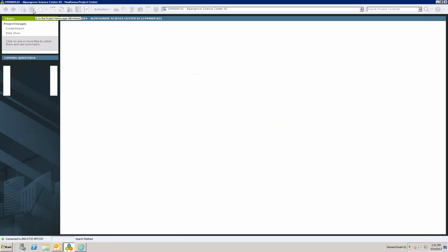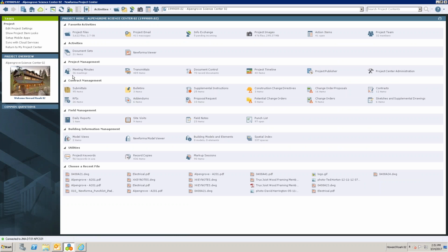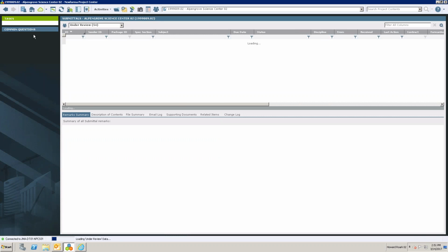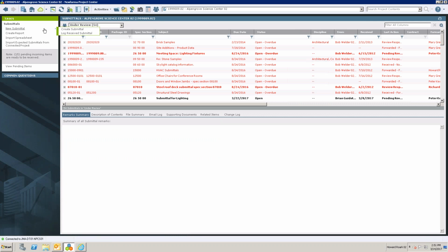Well, submittals are associated with the database. Because you have a folder called submittals doesn't mean it's going to create submittals and RFIs in the contract management portion. So these would both be blank. You would have to manually come in here and add a submittal and log that, each one individually. Correct. Because they're associated with the database, they're not line items that are built based off of one file, or a group of files, whatever it might be.